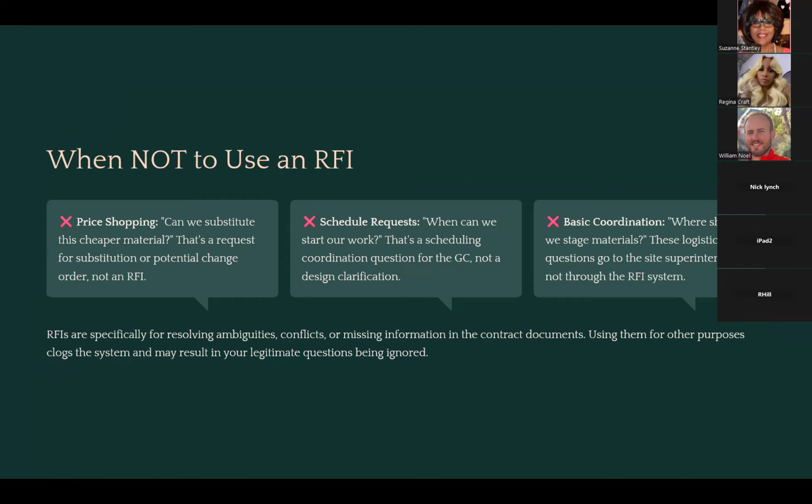Yeah, when not to use an RFI. So RFI, a very useful tool. It's not for everything. Yeah, pricing. So there usually is a particular substitution form that you can provide with your submittal about price shopping. That's not something that really belongs in an RFI.